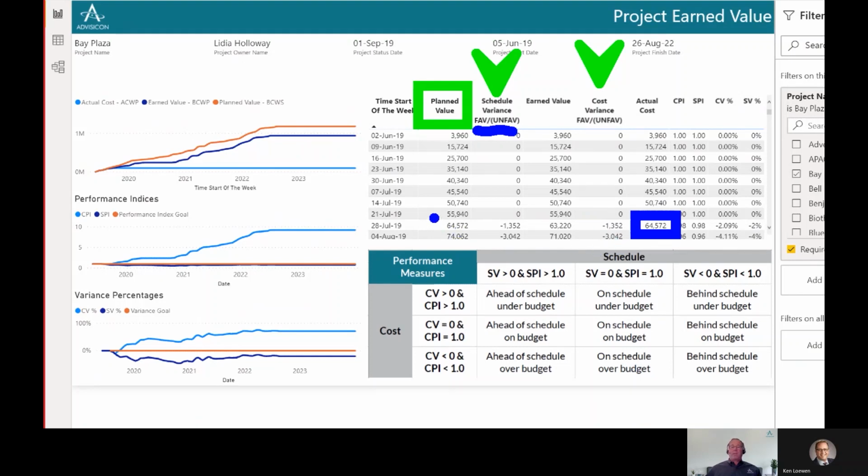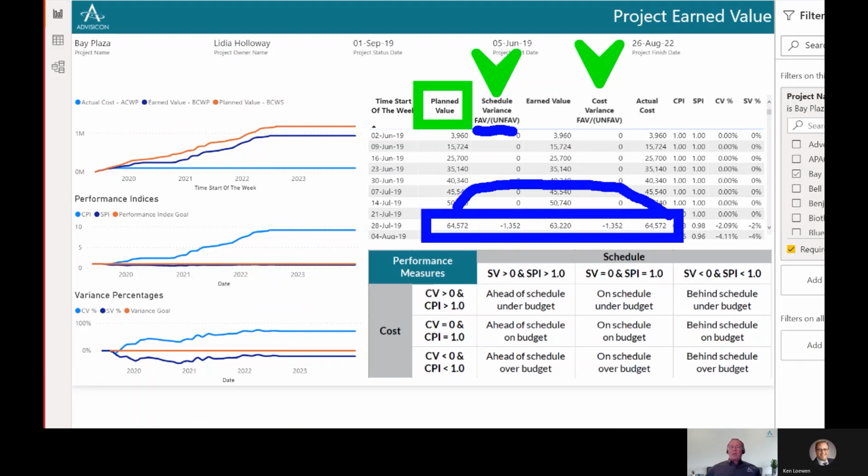So we did the amount of work that was expected, but we drove less progress, and it still cost what we expected to spend. That's a pretty important metric for a project manager to be able to understand. It looks like I'm exactly on my budget because my actual cost was equal to my planned value. But in fact, I spent the amount that was expected, but I drove less benefit for the organization. Therefore, I had a negative impact.